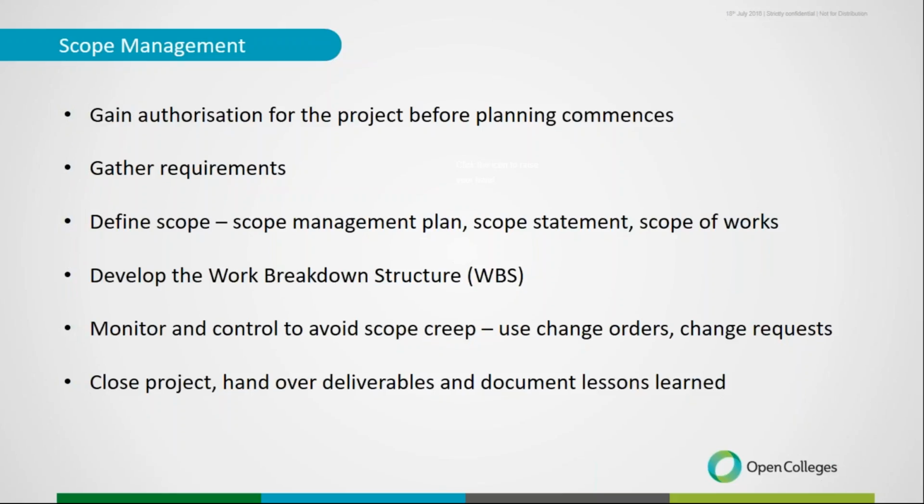So gather your requirements, document what's all about, and then from there, once you know what's going to be needed, we can develop up our work breakdown structure and start to break down the work within that particular project in the different areas. You can create a work breakdown structure by phase and follow that project life cycle, what's happening at the planning stage, and then moving into an execution stage and establishing it by different milestones, or it can be done by parts of the job and different deliverables that you need to deliver on.